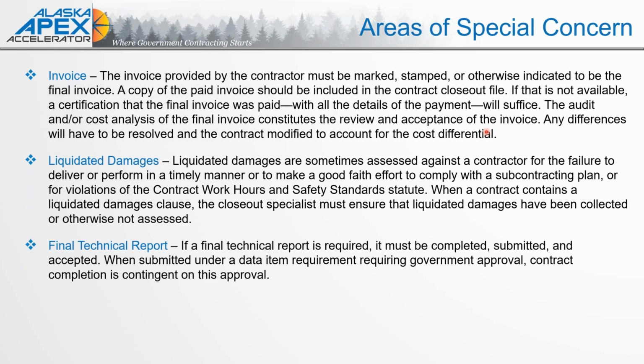If you have several contracts in play, and we're talking about even a penny differential of overpayment, you want to make sure that you have truly marked that EFT string and kept that information as proof of payment for that particular contract. You might not have something as simple as a check that you can have a copy of, but track the EFT information and make sure that you are marking those invoices as paid.